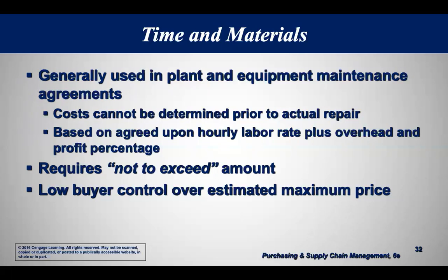But I'll let you know, and then he'll look at it and say, well, I think it's going to be 2 hours work, but you have to replace that pipe, this pipe, and these fittings, so it's going to be $200 for the materials. And you say, okay, go ahead, but no more than $600 total. And they say, okay, fine.